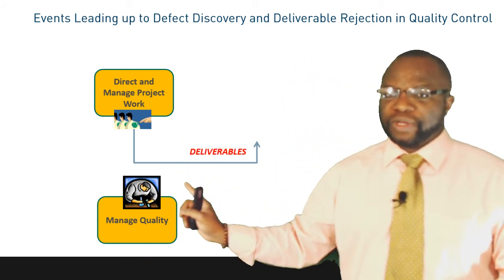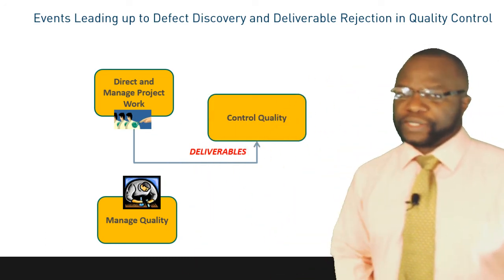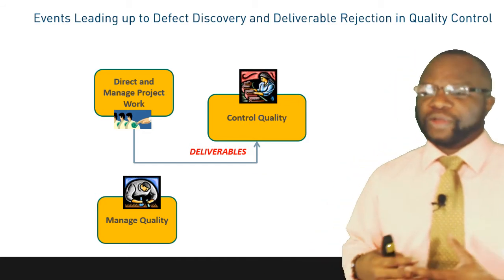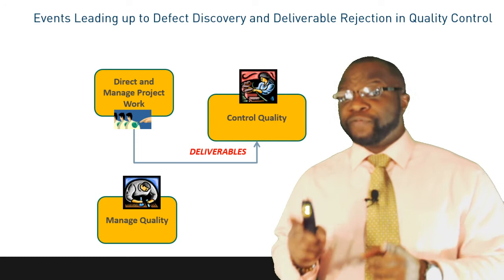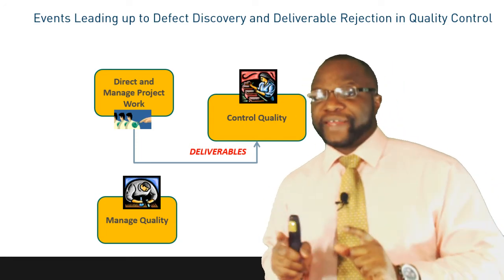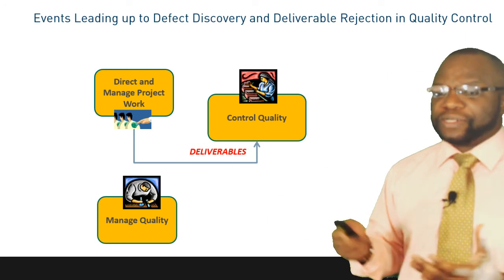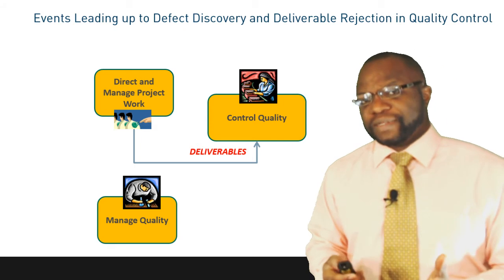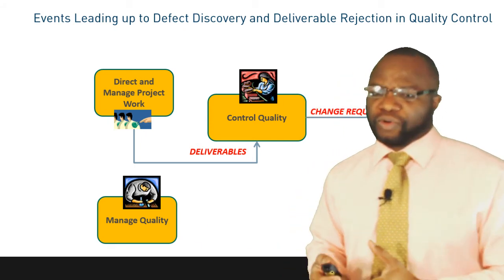Deliverables come out of Direct and Manage Project Work and go to Control Quality. In Control Quality, we are checking to ensure that the deliverable is fit for use, conforms to requirements, and will most likely satisfy the customer. So we have the lady on the conveyor belt taking a look at the deliverables. She decides this is not a good deliverable — in fact, there's a defect. So a change request is raised from Control Quality.